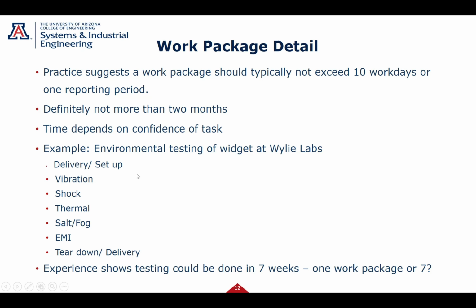You could. What if I set this up, though, instead of 1 work package of 7 weeks, I set it up to 7 work packages. Delivery setup, vibration, shock. I made each of those a work package. Now, at the end of 3.5 weeks, I should be in the middle of thermal. I go to the engineer, and again, he or she says, yep, we're in the middle of thermal, we're right on schedule, because I've set up these work packages. So how much definition do you want? How much do you trust and stuff? Usually you like to try to set it up so that you can get some better measurement of where you are along the way.